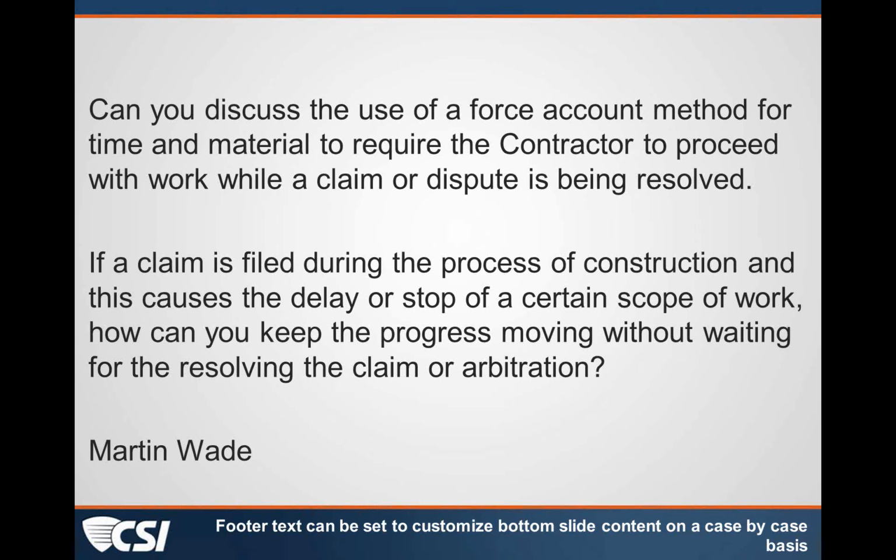So the AIA document kind of covers different situations, and it's just kind of a broad brush picture, but you can rely on any of those clauses to protect all parties. First, if there is a claim, the last section says that the contractor has to proceed with the work. He can't just stop the work, and he proceeds with the work pending final resolution of the claim. And then the section I read before that says that if there is a delay authorized by the owner pending arbitration or mediation, then the contractor is entitled to an extension of time by change order.